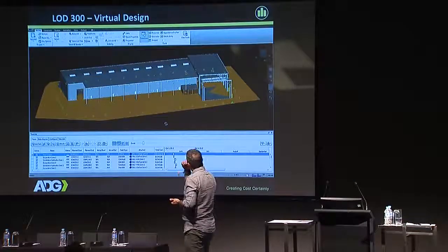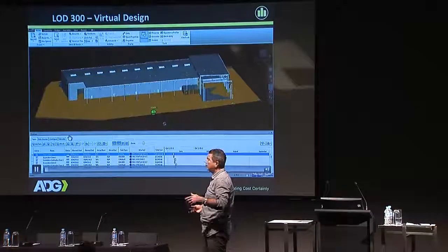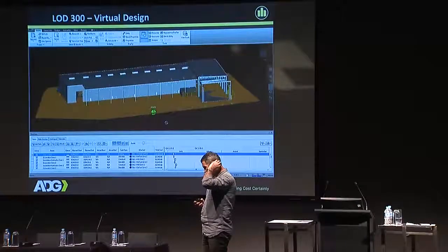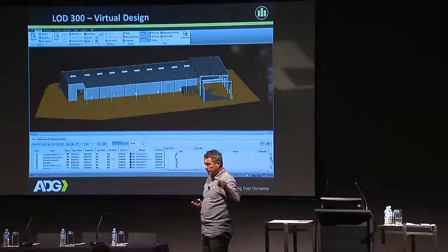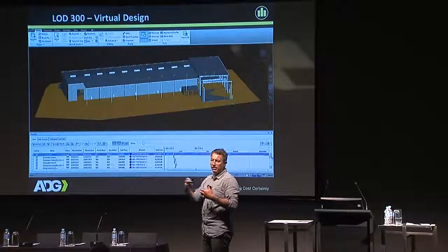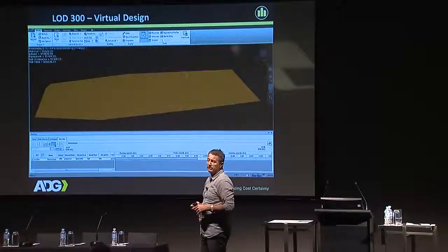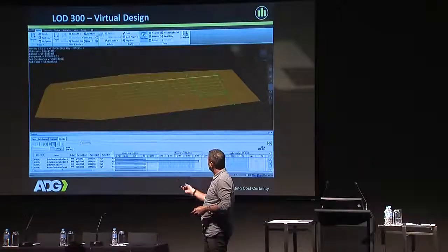But if we can just run this video and have a look at it. Basically what we did was we exported the activities from P6, ADG put them into the model. I brought those out of the model, I married our costs up with them, and then we pushed them into another database and back into Navis to have a look at it. After all that work, what we get is this little nice set of numbers.